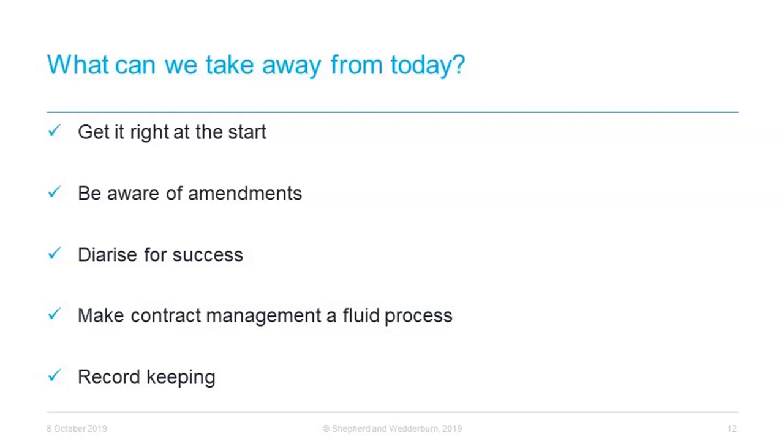Often, as you progress down the contractual chain, the use of standard form contracts becomes less common and the potential benefits of the GCT style is lost. It is very common to see amendments of the standard form, so you should be vigilant to this and take action accordingly, such as re-diarising due dates for payment and notice deadlines. Additionally, if amending the standard form yourself, try to ensure consistency in form and structure. For instance, it is advisable to follow the original contractual structure as much as possible by inserting any payment amendments into the payment clauses themselves.